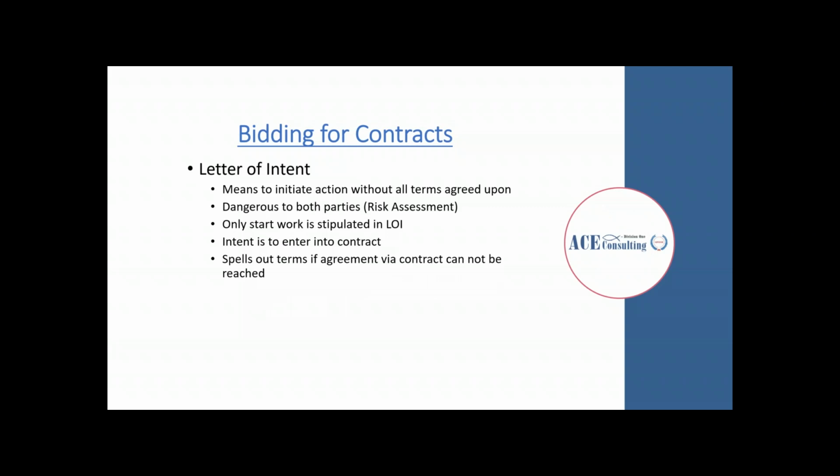A letter of intent is often issued during the bid process. It's a means to initiate action without all the terms being agreed upon. It can be dangerous to both parties because this letter of intent is ultimately signing on one party or the other to obligations that haven't been fully worked out yet.